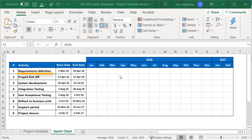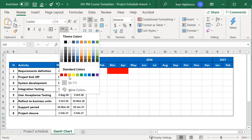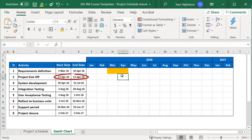Then, kickoff will take place in April, while system development will be worked on from April until the end of July. We mark these accordingly, under the respective months and to the right of the respective activity.